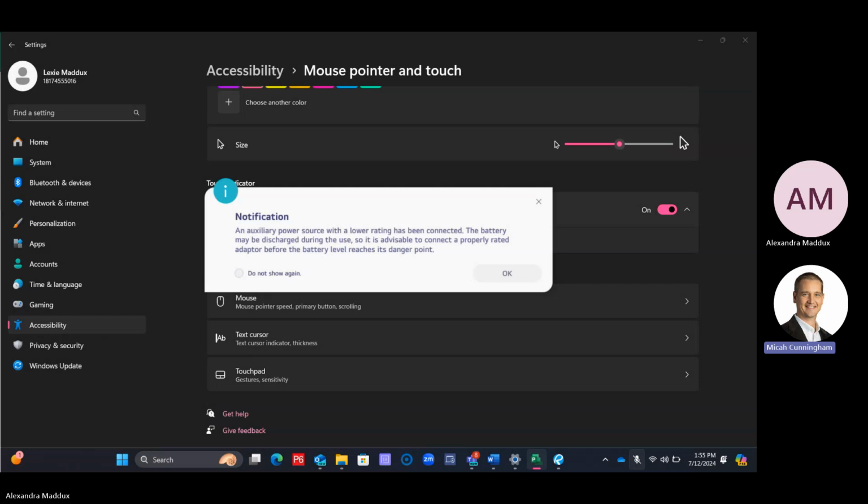So you can do the start to start plus 1, you can do the finish to start -3, and you'll get the same date. So I'm just going to change this here just to show that it's the same date. So if I did the start to start plus 1, then it's not going to move. It's still the same. So I'm going to put it back to the finish to start -3 days.